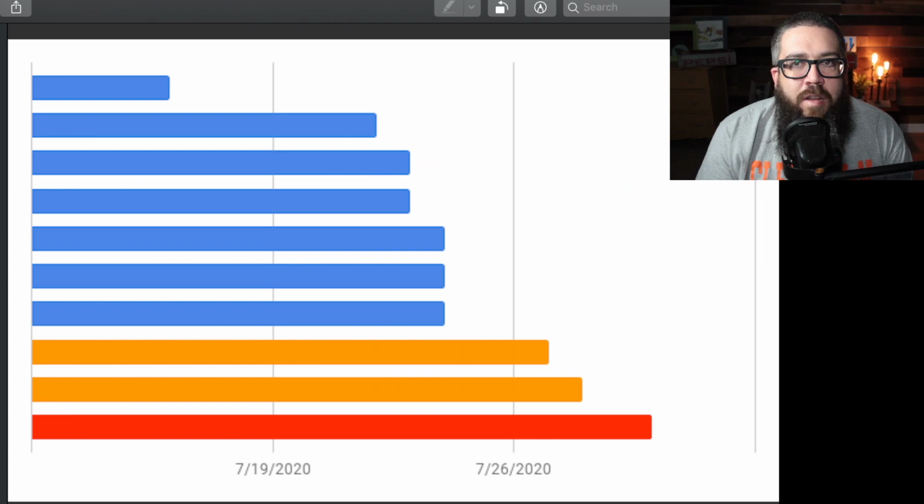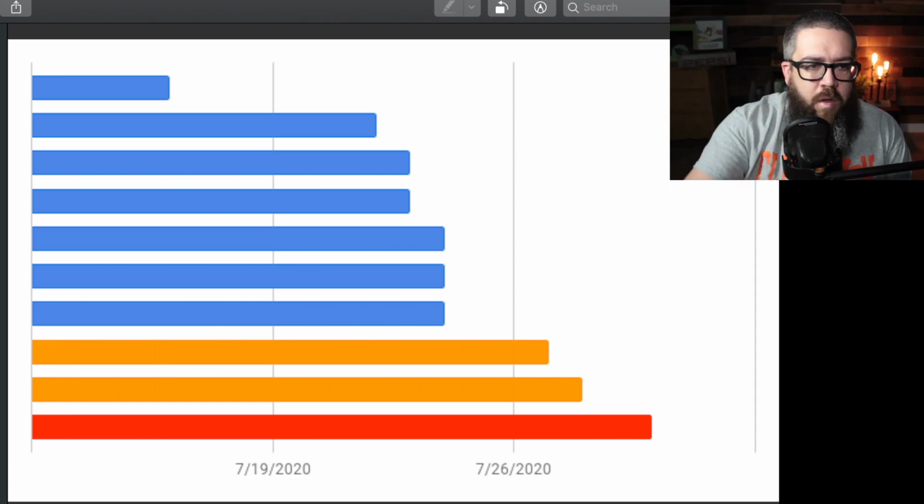So automatically their WIP is just, in this case, this team's WIP was already at 16 stories the minute it walked out of planning. That's not what we want, right? So whether they're using a task board or something to try to manage that, I don't know. But they're not really managing their WIP. Okay, so a bunch of stories all started, and this is what's left in the sprint.